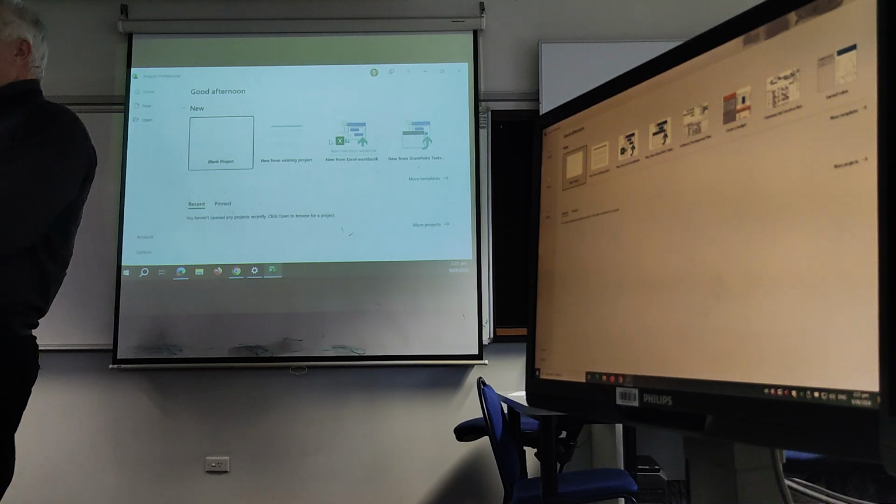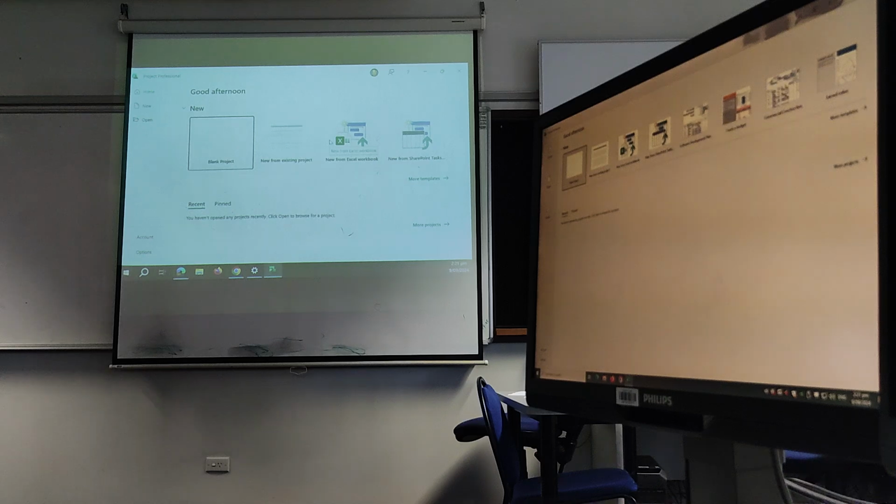One thing you could do is add resources. If you have more resources, what happens to the duration of a work package? Simple stuff. What happens when you add resources to a task? Does it get longer or shorter? Shorter. So you shorten it by adding resources. You have critical and non-critical tasks.